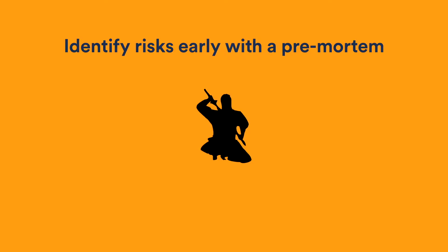You probably heard Dom speak yesterday to the playbook, and this is actually one of our plays. It's called a pre-mortem. A pre-mortem is exactly like a post-mortem, which happens after a project's failed and you want to work out why. With a pre-mortem, if you've not heard, you do that up front and you pretend that the project you're about to start on has just failed.